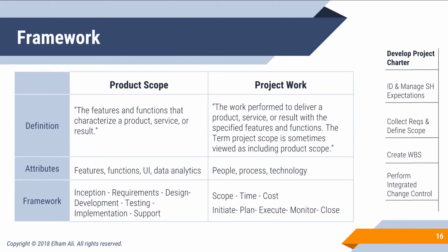So one example that I would bring in here is I'm currently consulting for an organization in which I have to deliver an MVP, which is a minimal viable product. And one of it is a health information management system that I have to build with the team that comes from various requirements, and various people have completed it in the past but have not fully achieved the right quality requirements. And so in this case, before I started on the project, I was able to ask the project sponsors on what is currently the most important to them. And to them, it's basically scope, adherence to requirements, because time and cost are leeways in which they're flexible on to work on in the next 6 to 7 months. So that's something that gives me an idea on how I can move forward with the project and meet expectations.